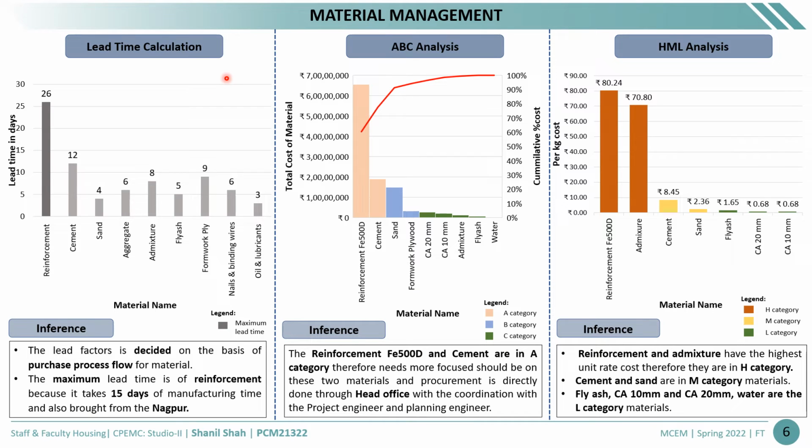Next is the material management. So we have done the lead time calculation. So the maximum lead time is for the reinforcement material, and that is 26 days. This is maximum because the reinforcement material is procured from Nagpur.